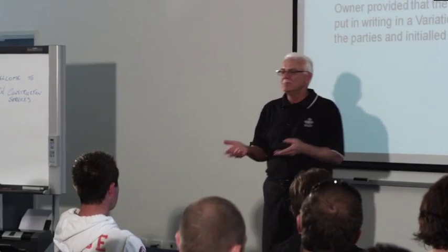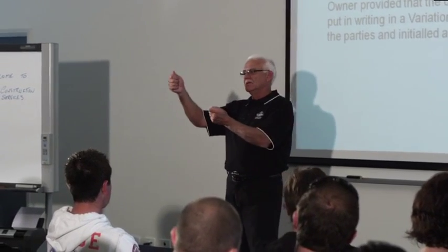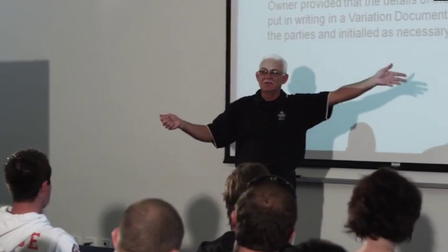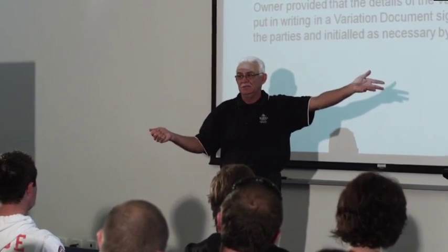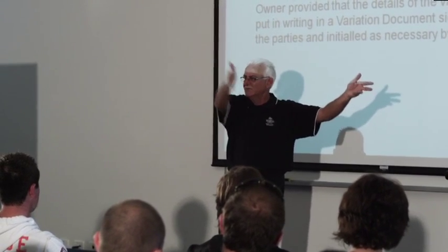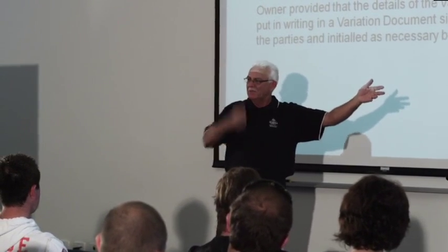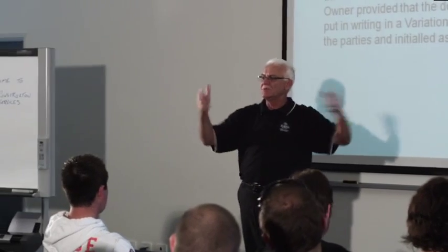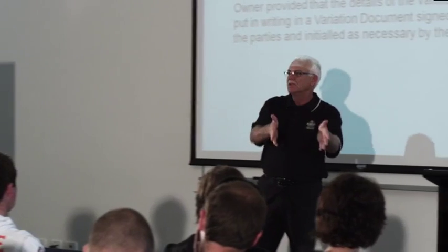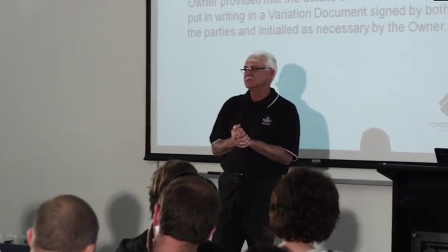But if you don't, because you've got to get contractors back on site, right? So they've gone to another job, they might turn around and say, look, I can't get back there for another 6 weeks. So you don't know how long it's going to take you to do this at the time of variation. You're happy to do it, but it might be a long time. So you wait until the job is complete, then you put in a time extension claim on a variation.